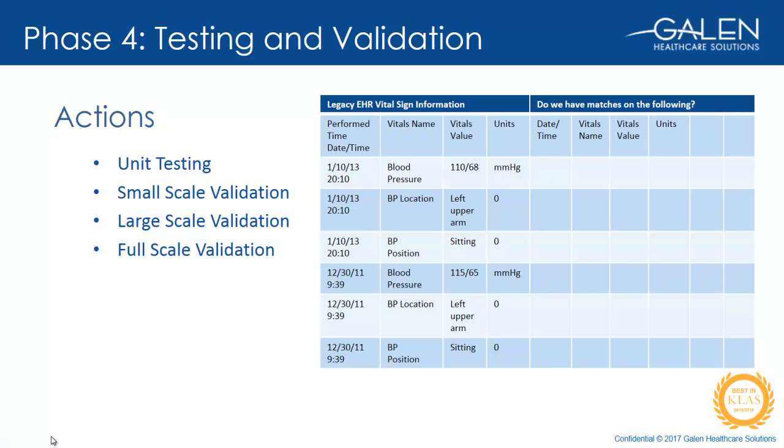The number of testing rounds may vary by project, depending on things such as the length of the project timeline and how many testing environment refreshes are being planned. But in general, there are 4 different phases, each with its own distinctive purpose. Each testing round takes about 4 weeks, and this would include setup, coordination, the actual testing, and issues resolution. The first testing phase is unit testing.